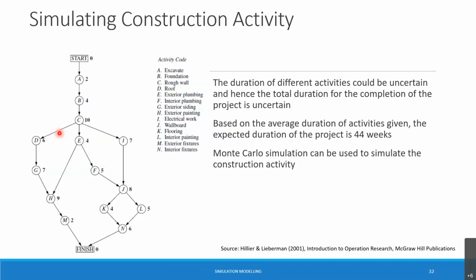And then based on the analysis of all these scenarios, I can try to find out what will be the time of completion, what could be the probability of delays, and how many weeks of delay there could be. All this analysis I can make and then use that to really understand, say, before I bid for this. Okay, so this is just another example of multiple simulation.